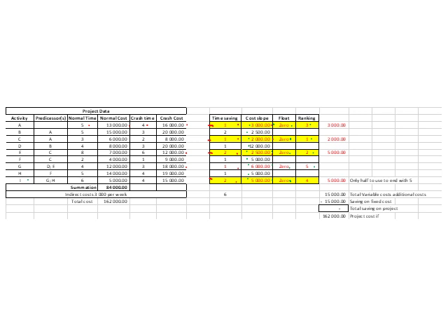What we want to do is reduce our project by 5 weeks. What I just did here is to show you that if you add all of these items highlighted in yellow, you will get to 6 weeks, and thus for one of our items we don't have to use the full weeks.